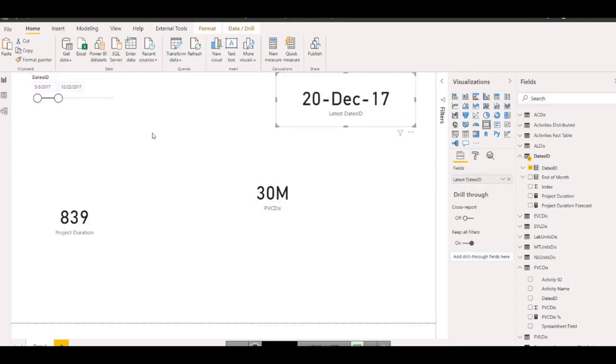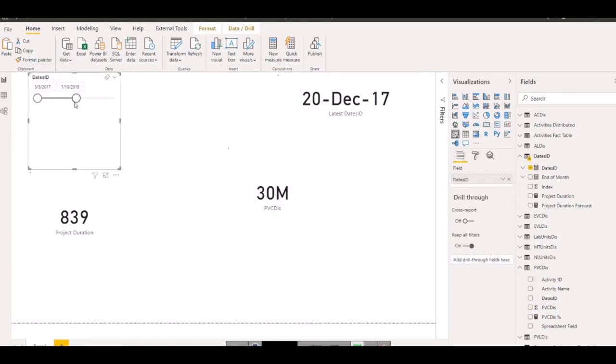So we also want that if my value is changing for planned value, earned value, SPI, CPI, if everything is changing with the time, why not the time elapsed should be changing with that as well? So that's why I'm going to use this value for the time elapsed, not the static data date, because we want a variable data date inside our model. So for that, let's now dive into again the project time elapsed.